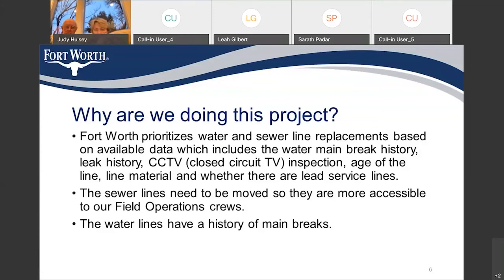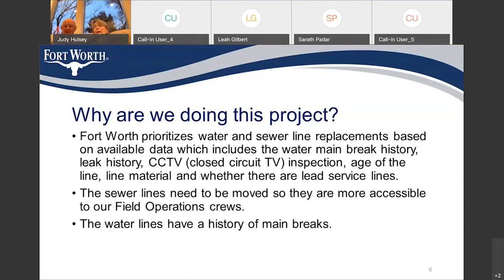Generally speaking, the water main is underneath the curb and the sewer mains are underneath the sidewalks. Rather than trying to replace those in place, we're relocating them out into the street so that they'll have better access for the water department.